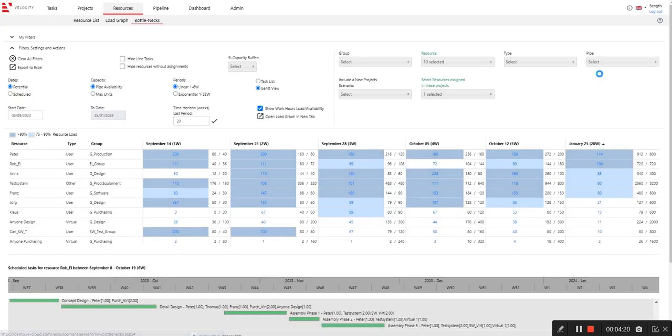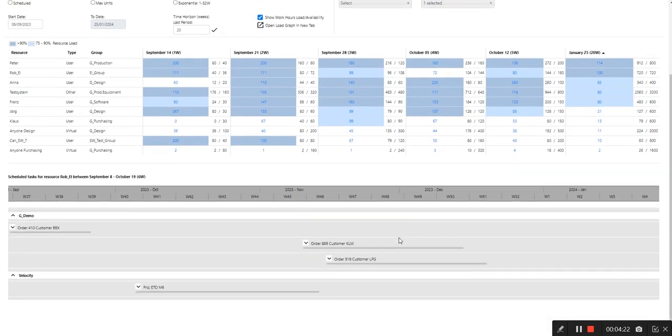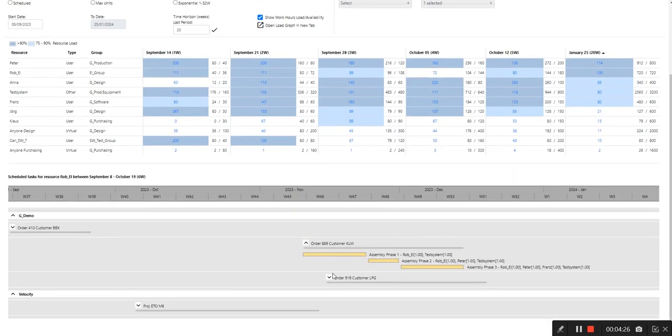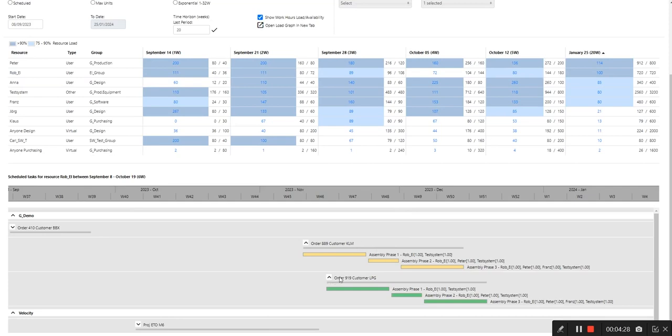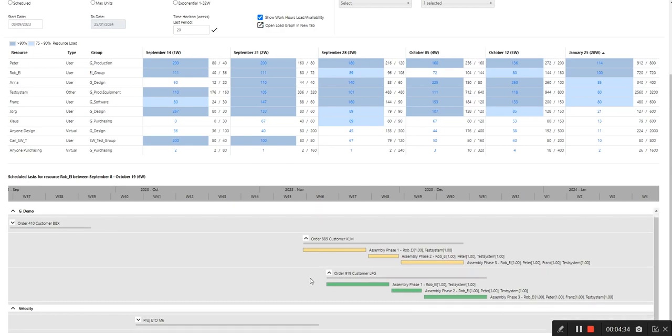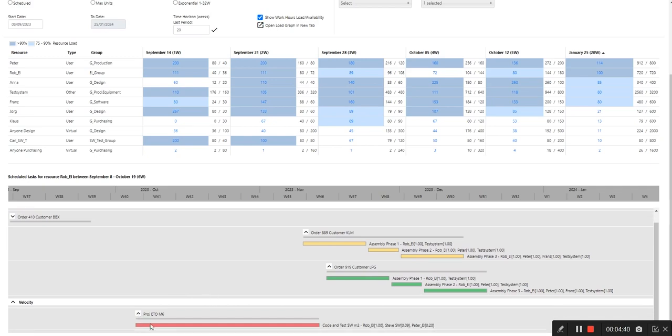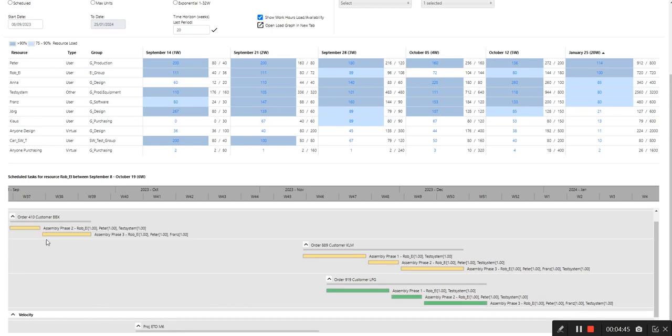So this is Rob, Electrical. We can see here he's coming working for your project. You have a conflict with another project, but this one is green, so I think that you will have him first. Then before he arrives, this is a problem. He's doing a red task. So let's look at the full story.